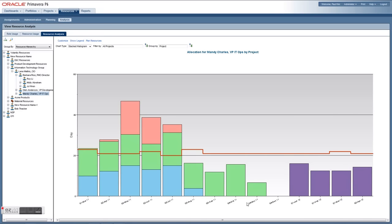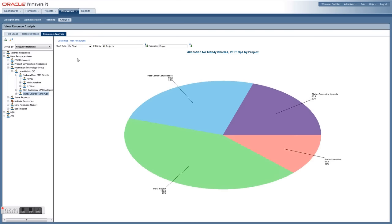Take a real analytical look at resource allocation with the resource analysis module. View resource usage in a stacked histogram or pie chart to get a clear picture of where resources are spending their time, and take corrective action as needed.